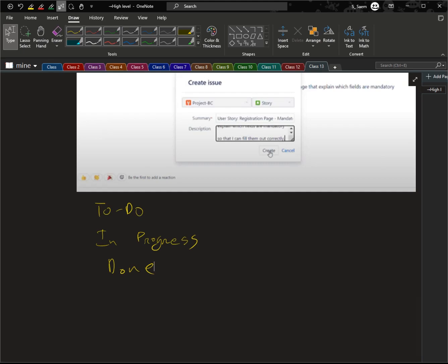Now, organizing issues in Jira. Drag and drop issues into their respective epics to maintain clarity and organization. Once an issue is linked to an epic, you can view all its child issues by clicking on the epic. So always use the Jira ticket ID for searching tasks. Searching by the user story name may lead to confusion due to duplicate or similar entries.